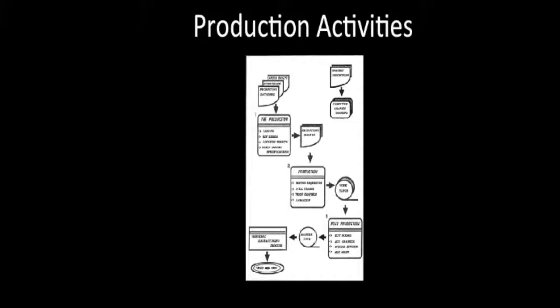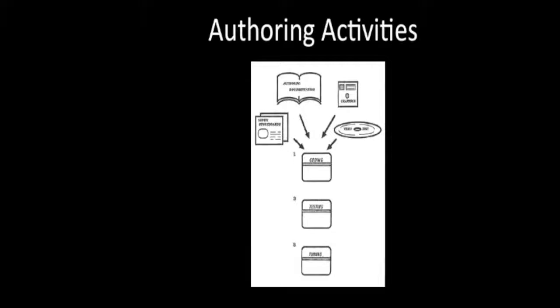The authoring phase includes the combination of all the sub-projects into one master project. The master project is tweaked based on documents such as the storyboard and flowcharts from the previous phases. At this point, the project manager will begin internal reviews, semi-formal external peer reviews, and target audience reviews of the project. The deliverable of the authoring phase is the near completed project.